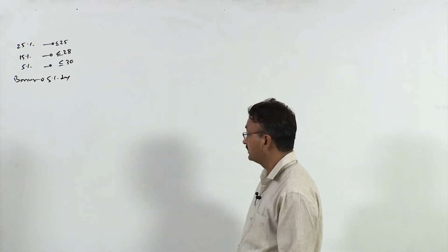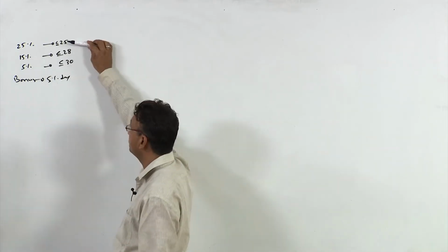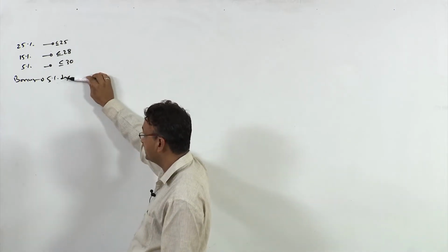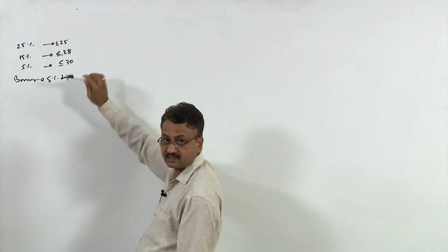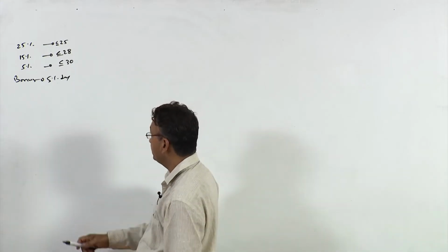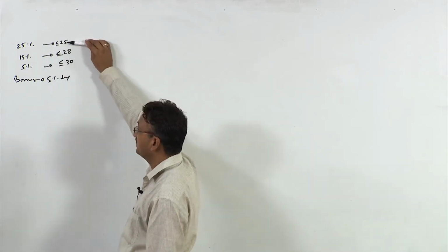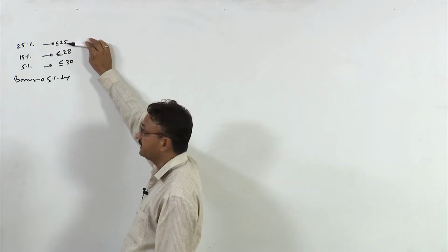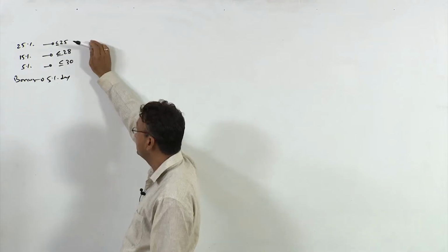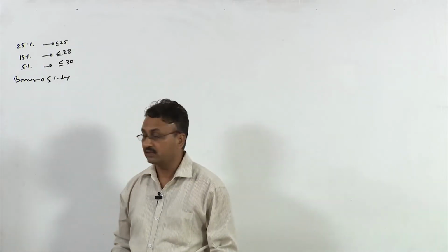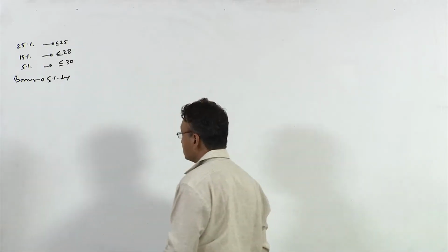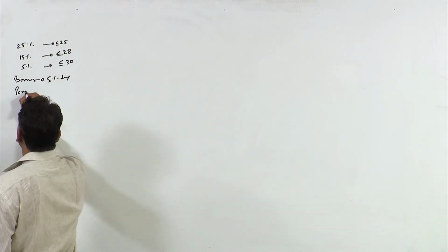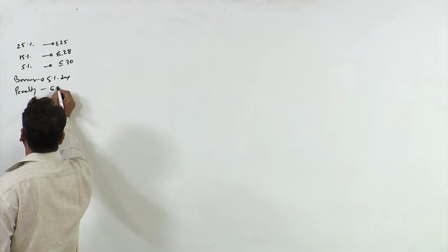If the company quotes, for example, 25 days, and it completes in, let us say, 23 days, then there would be a 10% bonus. Similarly, if the company quotes 25 days and it completes on the 26th day, then there would be a penalty of 1 day, and that penalty is 6%.